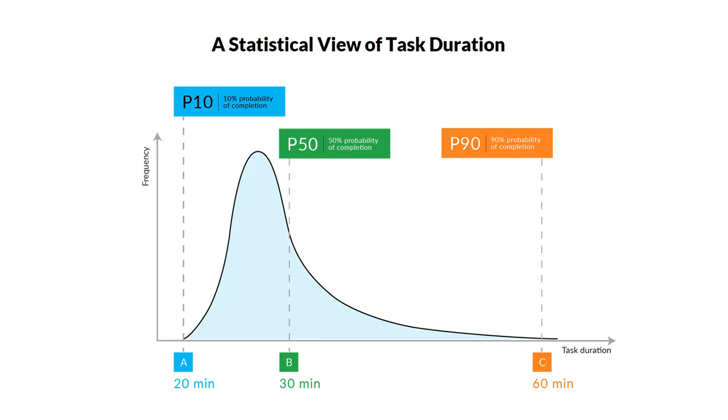If you are asked how long you will take to complete a 10-kilometer ride, what would you answer? What if you knew what the probability curve was like as you see in front of you, but you were told that as long as you estimated within reason, that estimate would be accepted? But once that estimate was accepted, there was a big penalty if you finished late. If you're anything like the rest of us, you'll likely opt for the P90 and keep whatever contingency you can get up your sleeve, just in case you end up drawing the short straw and having to ride uphill the whole way.